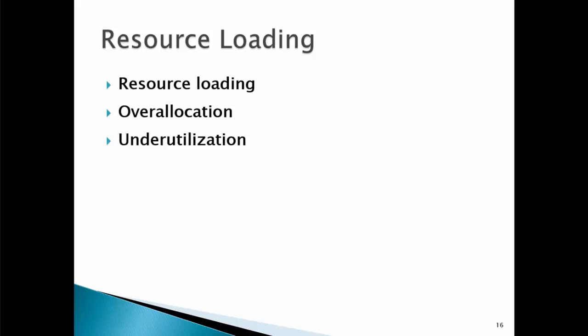It helps project managers develop a general understanding of the demands a project will place on the organization's resources and individual people's schedules, and how to schedule the people within that project. In that case, we have to understand two major problems: either overallocation or underutilization.